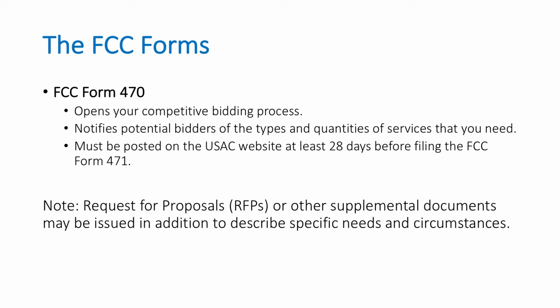Now, an RFP is not a required document. You have to kind of lean back on the state law for that. Depending on what Idaho is doing from a state law standpoint and what the contract amount is will determine whether you need an RFP document to go with the 470.